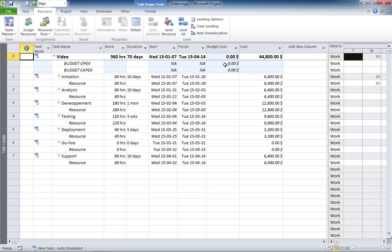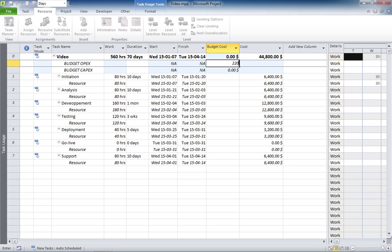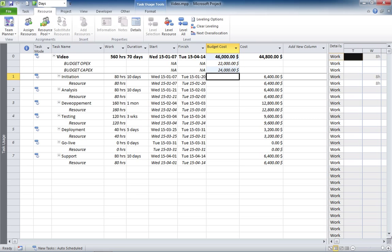Now, you see your two budgets are right there. So, you put something like, for example, 22K for the OPEX budget and 24K for the CAPEX budget for a compound value of $46,000.